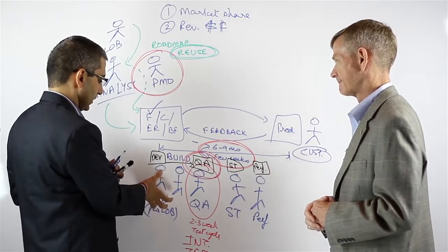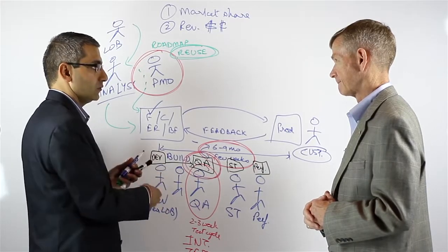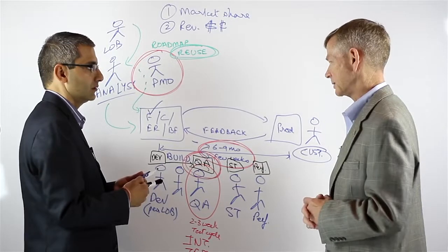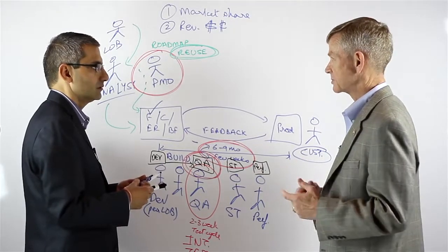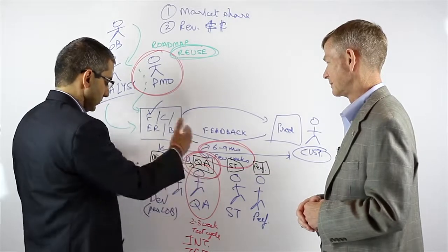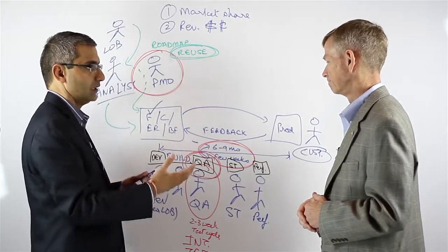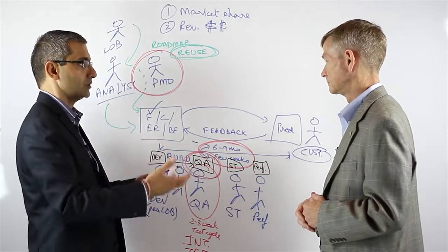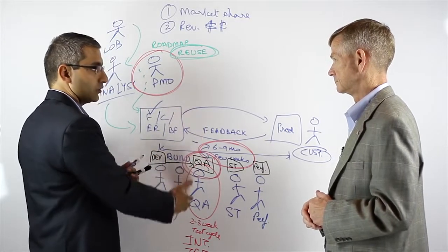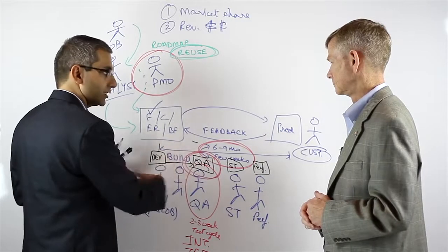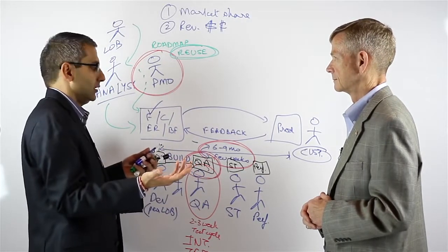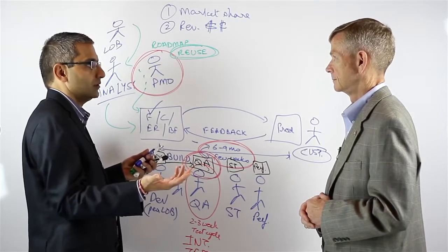Are you, from a development perspective, looking at agile practices? Yeah, we implemented agile last year in teams, and it's growing as a culture. Okay. So I think this then becomes your major bottleneck, right? Because if you have agile and you're doing continuous integration or daily builds, as you said you are, then QA not being able to handle it just creates a backlog of untested builds, which the developers are not getting any feedback on.